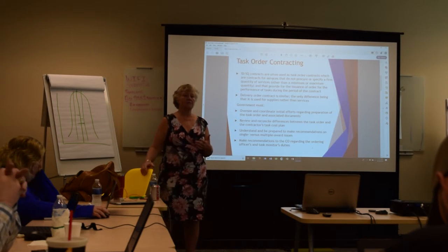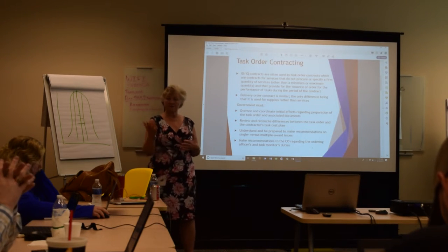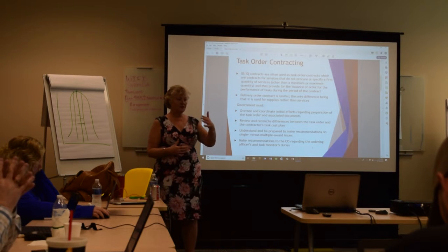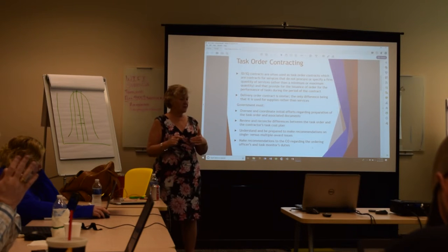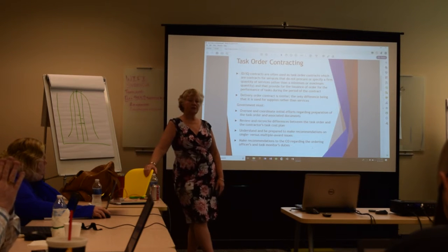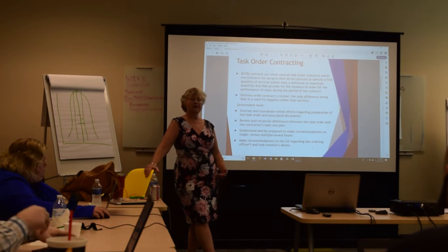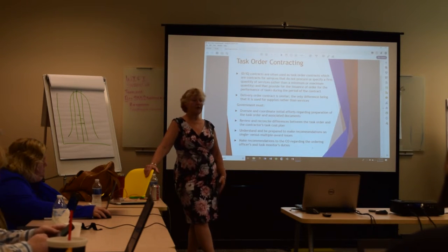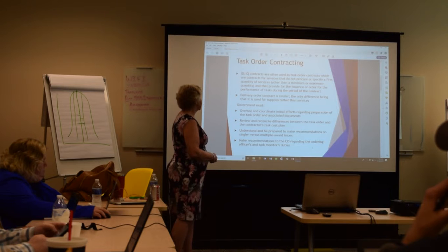So you just get prices for different labor categories under engineering from vendors. And once you know their prices, their labor rates, you can send a note out to them and say, this is the specific task that I need to have done. You tell me, based on your labor rates and labor categories, which labor categories you would have work on this piece of this task order, how many hours each of them would work, and what the total cost would be. So that's how you would respond to a task order request.